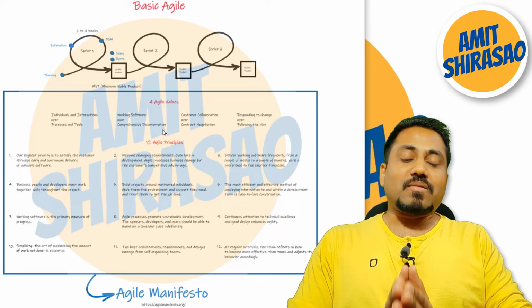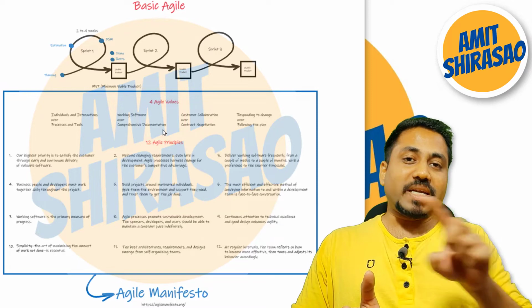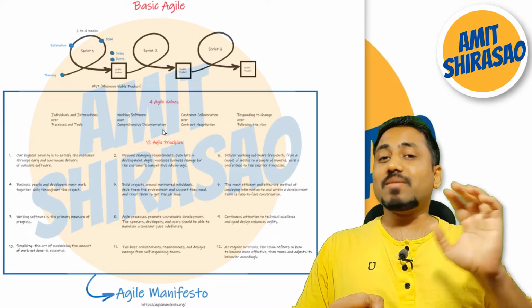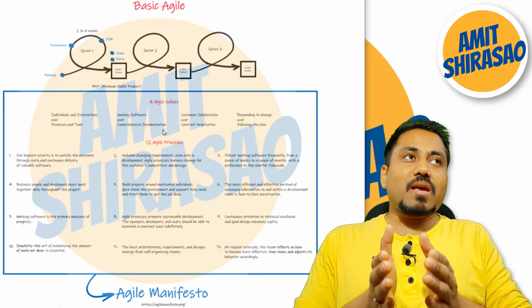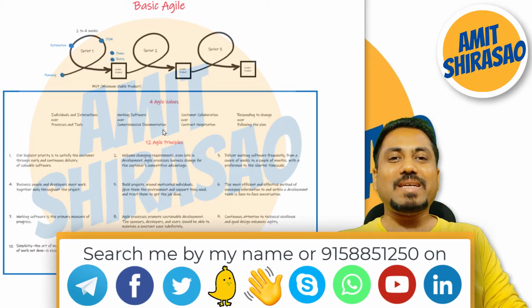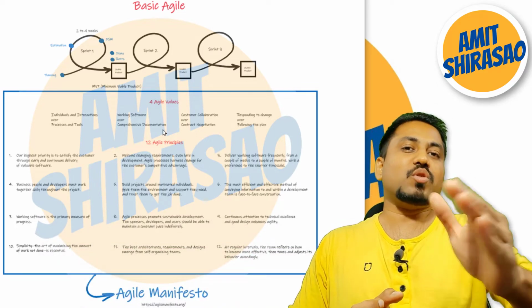And that's why in the first so-called sprint, which means an iteration, okay, I'll come to that. Sprint means the duration between every demo that you give to the customer. So as I said, every fortnight you're going to give a demo to the customer.